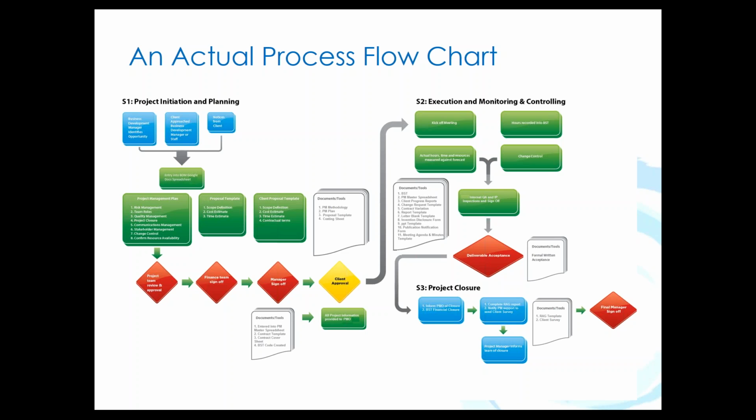And you'll see down there, after the documents are prepared, the project team must review and approve it. That was added in last minute, by the way, when we finally took it back and socialized it with the team. That was one suggestion from the team. Then the finance team wants to approve it, and then the manager signs off, and then it goes to the client for approval.